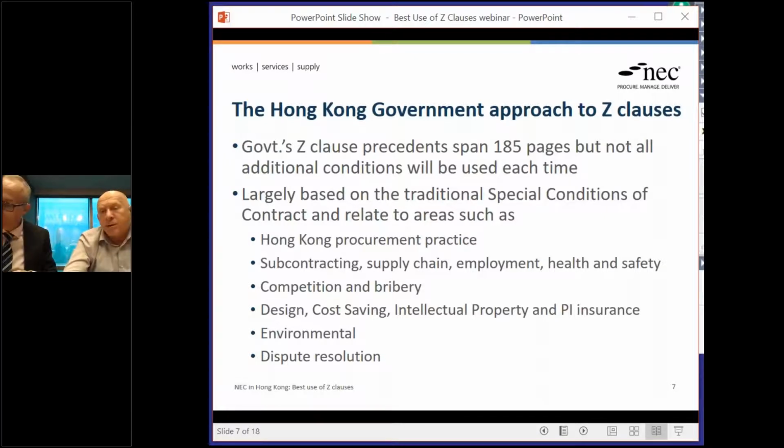One thing, once you consider the next one, is Y clauses. So Y clauses in the contract with national legislation matters. So we have Y(UK)1, 2 and 3, written around mainly UK legislation. We also have Y(NZ)1 and 2 written around New Zealand legislation. There's an anticipation of the security of payment legislation coming in at some point. Yeah. And then maybe we will have to write 1 or 2 Y clauses to make sure our contract fits here with the national jurisdiction. Absolutely. I think that'll be essential.